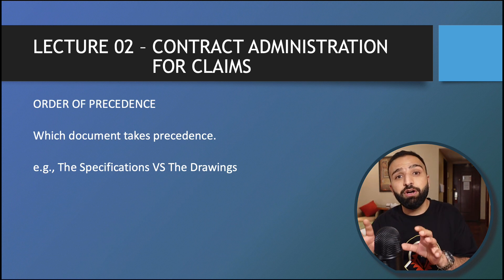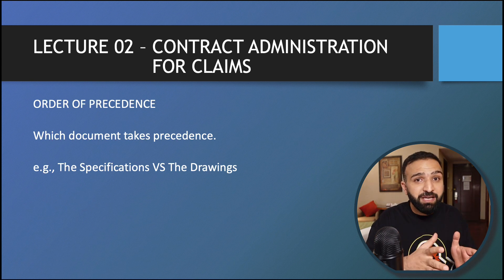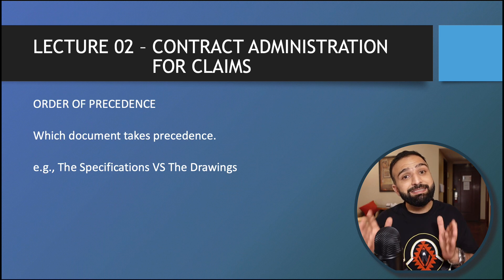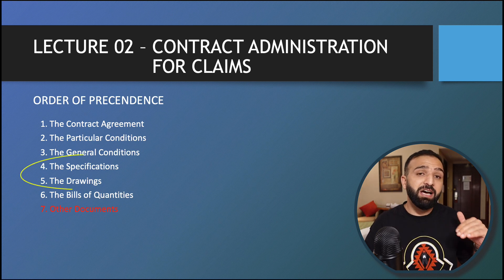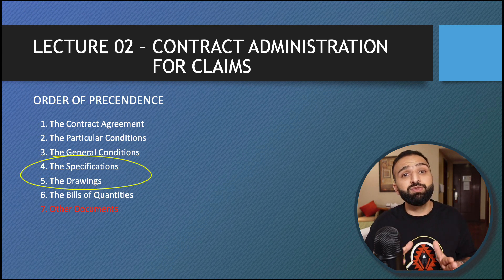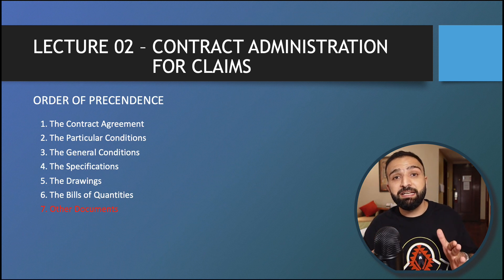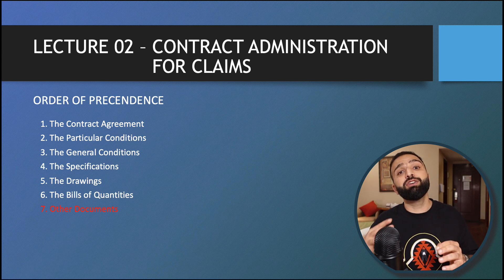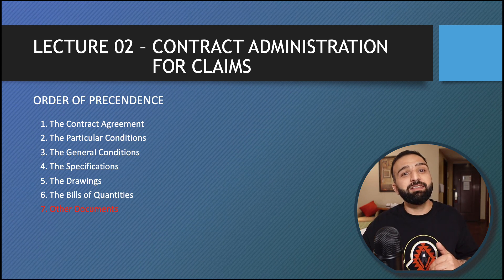The order of precedence is basically a list that defines which document takes priority over what. For example, during execution you find there is a conflict between the specifications and the drawings — which document should take precedence? As you can see on the screen, the specs are listed above the drawings, so the specifications would take precedence. This is the order listed as per the FIDIC books; your contract could be slightly different. If there is no order of precedence in the contract, you should try and make sure it is implemented, because it resolves a lot of unnecessary conflicts.